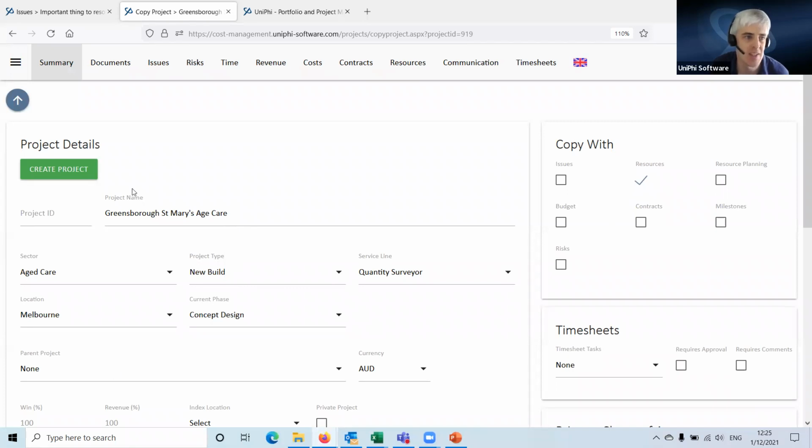You can use these configurations to keep them somewhere. You might have a lifecycle phase, which is template, that's a closed lifecycle phase. So you keep them there as a closed project, and you just go find them and then copy them to be a live project, so they don't show up in all your reports. So you can use this configuration to your advantage to achieve that.